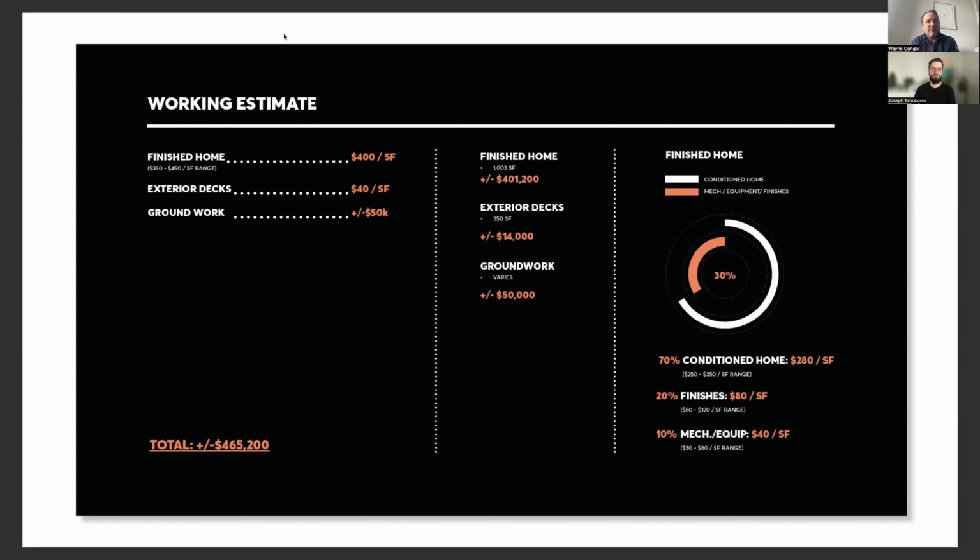And while there can be a moment of discussion there with our clients where it feels like we're policing some of what they're going to get, it's also guaranteeing that the house actually happens. And that's a number one consideration for us. The most important things, the most unique things to them get into the project, and other places that could be upgraded later or maybe are less important, we use them as levers to come down in cost and make sure that all of the budget balances out here.